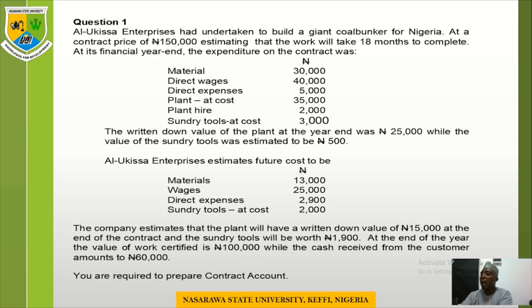Now, if you add 89,500 plus 51,500 to get your total estimated cost, don't forget, cost incurred plus estimated cost to completion equals total estimated cost. The cost incurred is 89,500 as per the question. Then estimated cost to completion was 51,500 as per the question, which gives the expected future cost. Now the total expected cost becomes